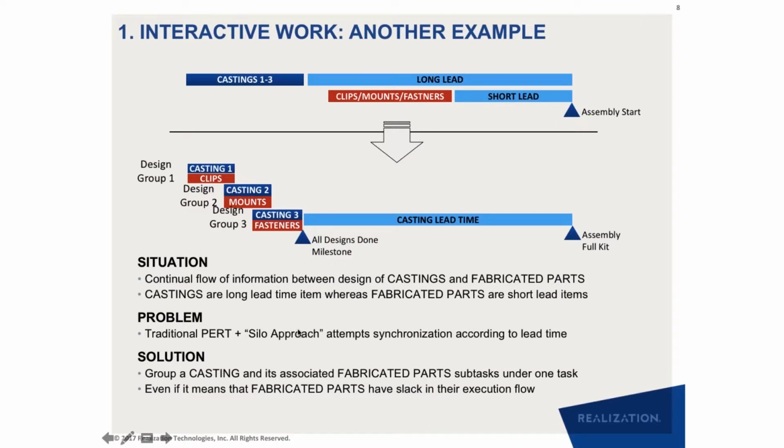So it's a very similar situation to before, but the contrast here is that traditionally you would have long lead time design and short lead time design. But that creates a lot of rework, because after you are done with the casting design, when you go and do the clip, mountings and fasteners design, if there's some design decision that has to affect the casting, then you end up doing a lot of rework. So this was another example.